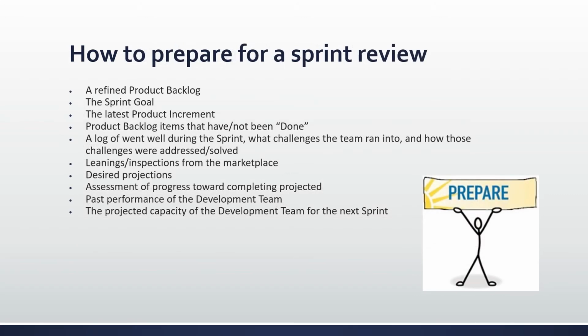So how to prepare for a sprint review? Well, it pays to have the following prepared for the sprint review. The Scrum team self-organizes this and is helped by the Scrum Master. You should have a refined product backlog. You should have a sprint goal, which includes the progress made and the known work remaining.